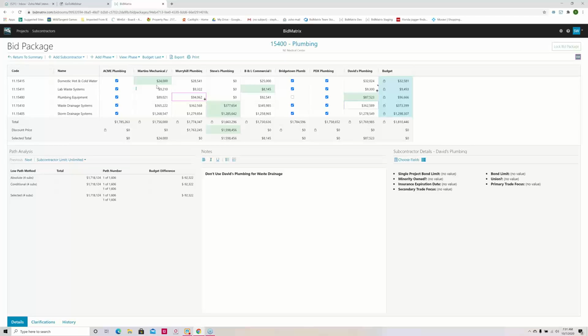But we don't want 4 plumbing subcontractors doing this work. We would like to limit our path analysis to 2 or fewer. So either 2 subs or 1 sub. What would that cost me to go from a 4 sub solution to a 2 sub solution? Well, not very much. It's only going to cost me $3,000 here.